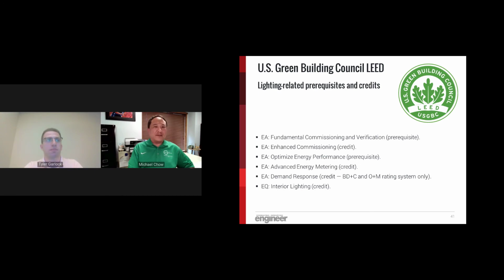So for the enhanced commissioning, the lighting designer would be taking a look at the shop drawings, the submittals, approving them, making sure that if there's a requirement such as DLC, that's met.